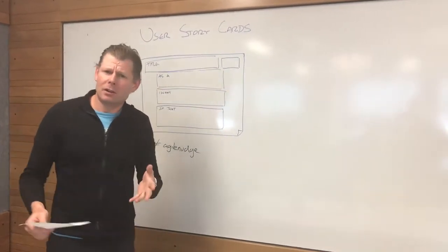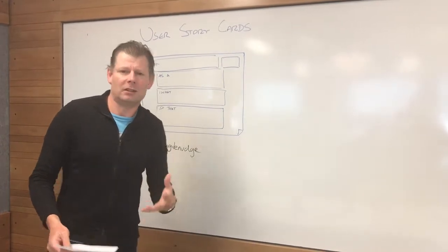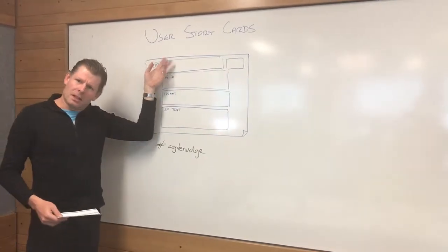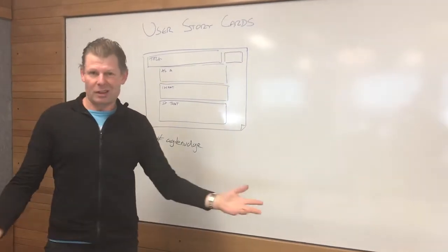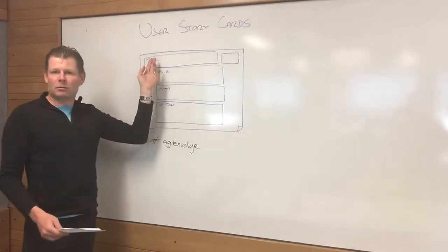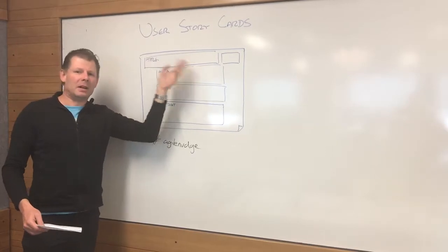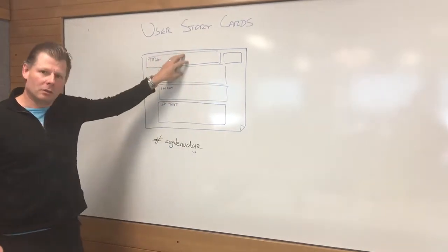So we have the standard format of a user story. In Scrum, you don't have to use a user story, but it's the most common practice. We have the title. So rather than having a code that no one knows, the FB234, what does that mean? You say, Tommy in Toronto, payment expired, problem. So we know what we're talking about.